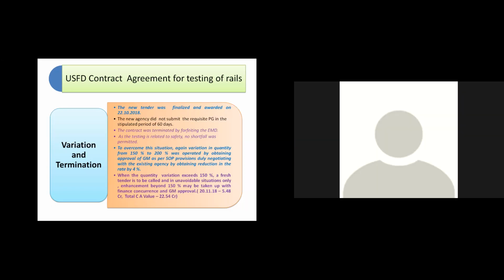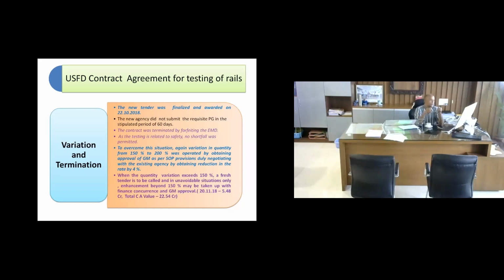But now the issue remains, how do you carry out testing? Because your in-house capacity is insufficient for adhering to the schedule of inspection of USFD testing. So this is a case where probably variation beyond 150% is justified. That's what I want to convey to you.